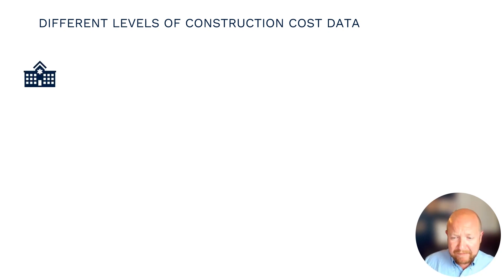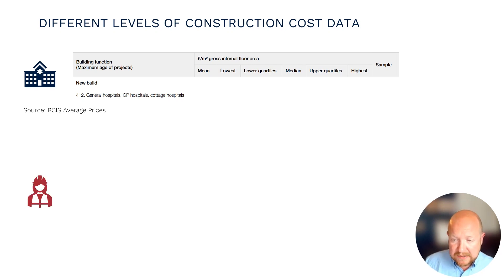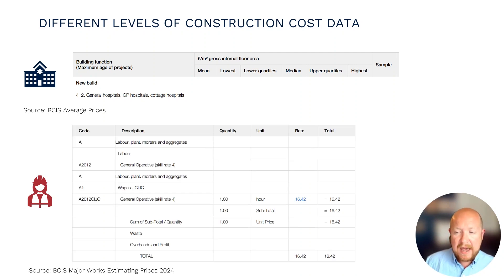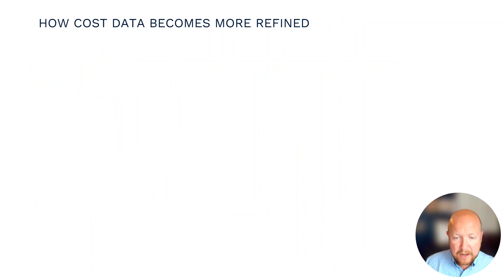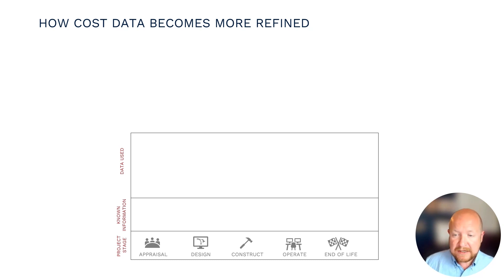To give a couple of examples of what this might look like with BCIS data, keeping with the hospital example, in our average prices we have cost data for different kinds of hospital facilities, providing a range of high-level cost estimates. From there we can travel all the way down to individual resources — in this case, labour operative use in a major works estimating guide — where we have a cost per hour for completing a specific work activity.